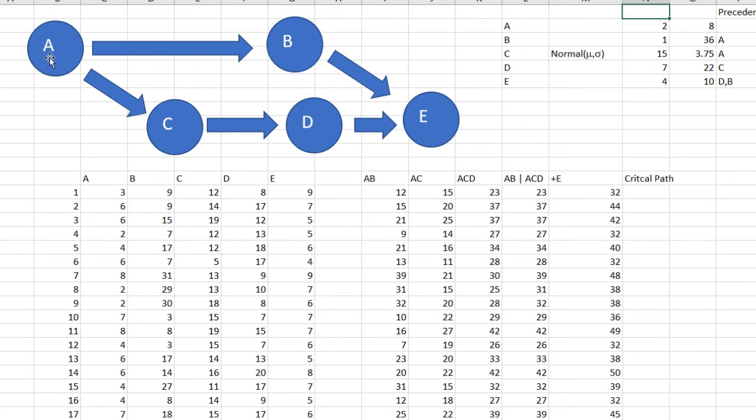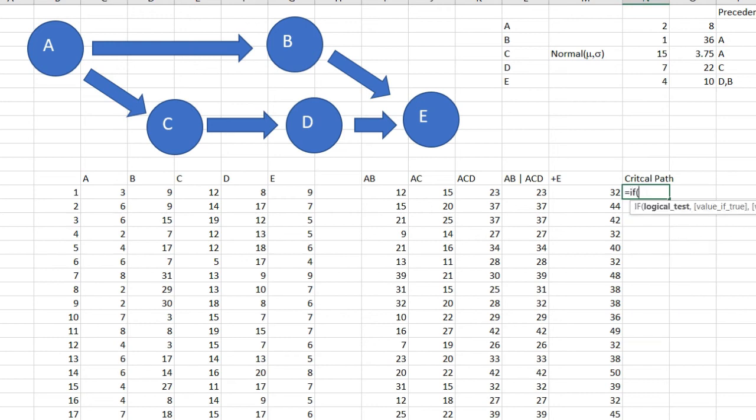What makes it critical is the evaluation of which is the longest time: AB or ACD. So I'm going to select the critical path by evaluating which is equal to the maximum—is it ACD or ABE? So if ACD is equal to the maximum, if this is true...